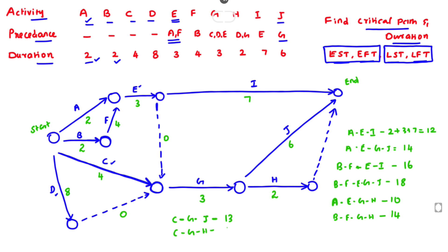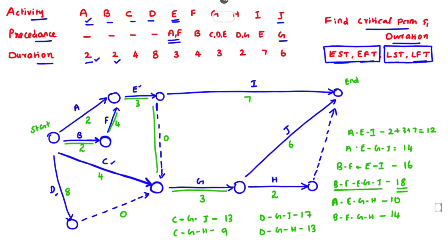Path D–G–H: 8 + 3 = 11, plus 2 = 13 days. The maximum duration among all paths is 18 days, which belongs to path B–F–E–G–J. We draw a double line along B–F–E–G–J to indicate this is the critical path. The critical path duration is 18 days.